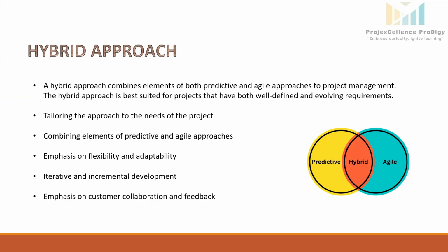Iterative and incremental development. The project may begin with a traditional planning phase to define the high level requirements and establish a roadmap. Later on, the development work can be carried out iteratively and incrementally, with each iteration delivering a subset of features or functionality of the product.